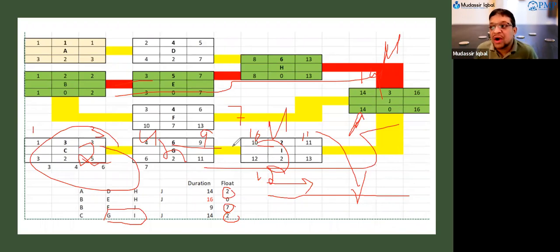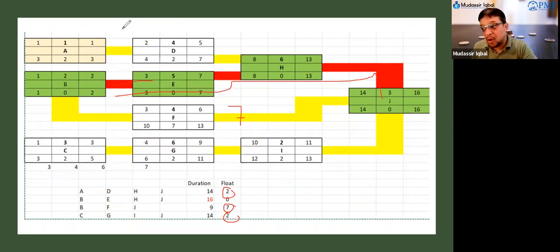You found it that this activity is a riskier activity, and you have 2 resources. So you said, fine, I will take resource here, low cost resource here, because I have a time to actually, if any risk happen, then I can recover. So float, leads, lags, compressions, fast tracking, crashing, these are all tools in your hand that you would be using at different points.